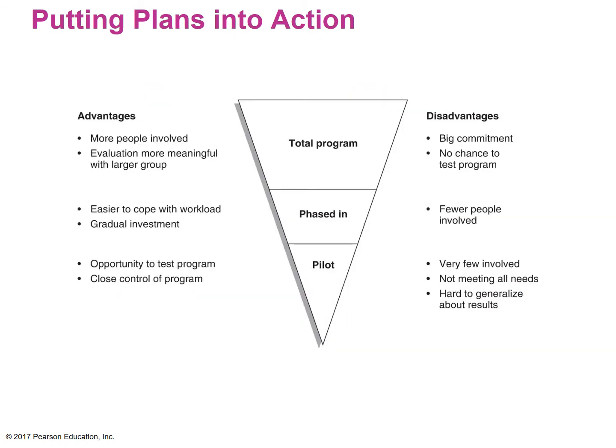So we go through here and we look at the pros and the cons for each way. All right, so with pilot testing, the advantages are opportunity to test a program, close control of the program, right? It's smaller, it's more manageable, you get to see things. A disadvantage, very few are involved, so in terms of success, it's only going to be possible among those involved. Not meeting all the needs, again, you're using a subgroup. Hard to generalize about results.